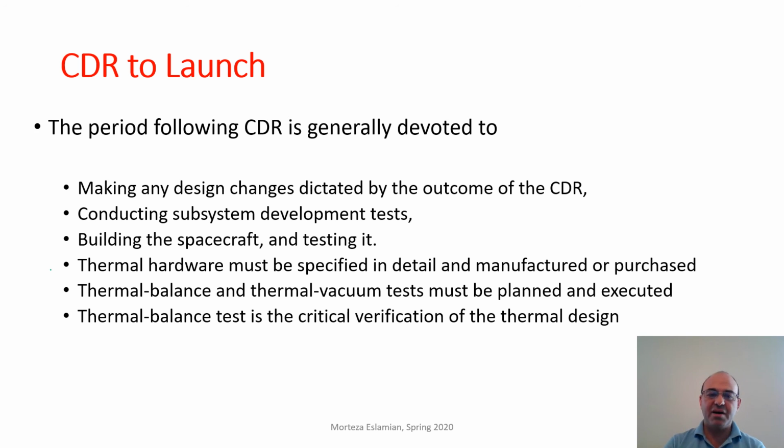Regarding the thermal part, the thermal hardware must be specified in detail and manufactured and procured. And then once the thermal hardware has been procured, the thermal balance and thermal vacuum tests must be planned and executed.